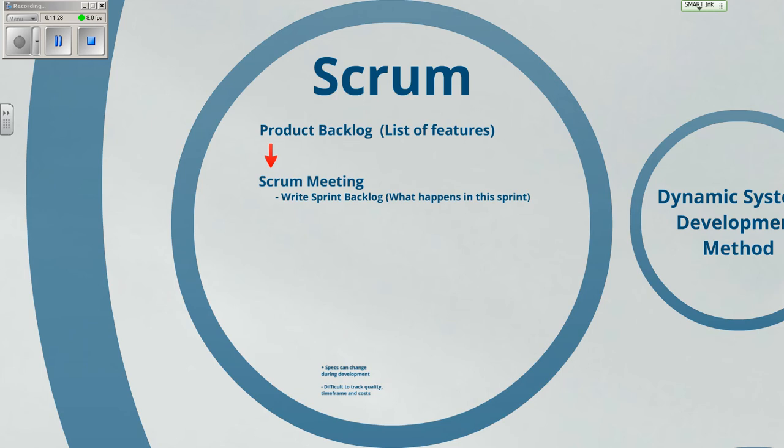Rather than having a project where you set all the goals for the project, and then you spend, say, for example, you've got 6 months to work on a project. In the traditional software development lifecycle, you'd spend half of that time planning and preparing and designing and analyzing, and then maybe a month coding and then 2 months testing. The way you'd approach it with Scrum would be you start with a list of features, and if you've got 6 months, then you might have 6 sprints, each sprint lasting 1 month.